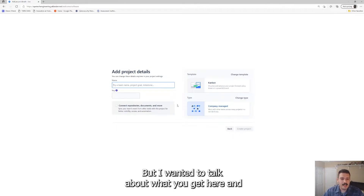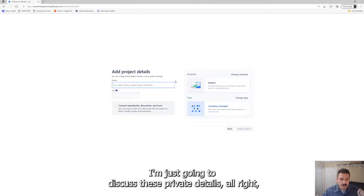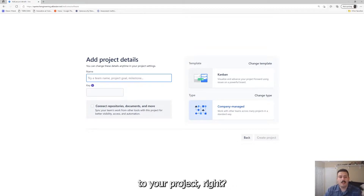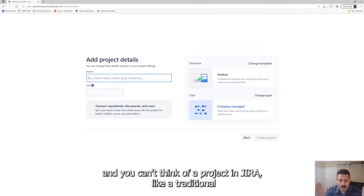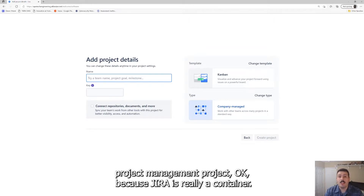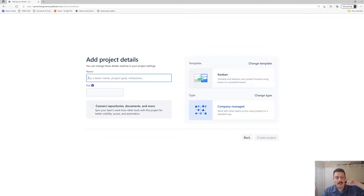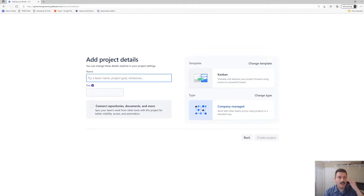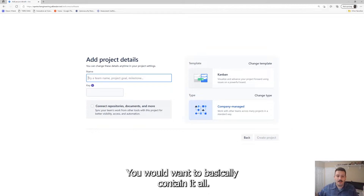I wanted to talk about what you get here and the information you need to know. The first thing is you've got to give a name to your project — you're getting a Jira project workspace. You can't think of a project in Jira like a traditional project management project. Jira is really a container. It's like Microsoft Project in a sense, and you have to treat your Jira project as that container — you wouldn't create a whole new Microsoft Project for every different effort.